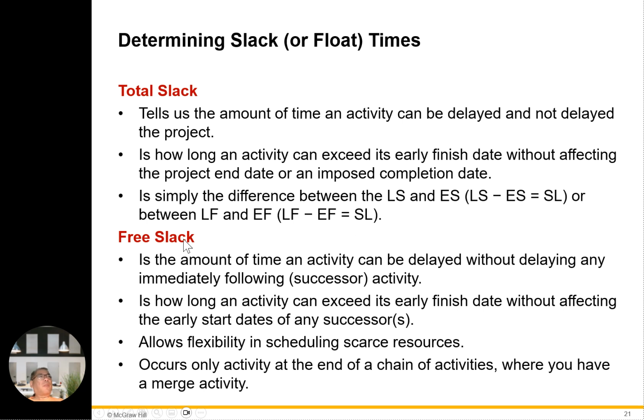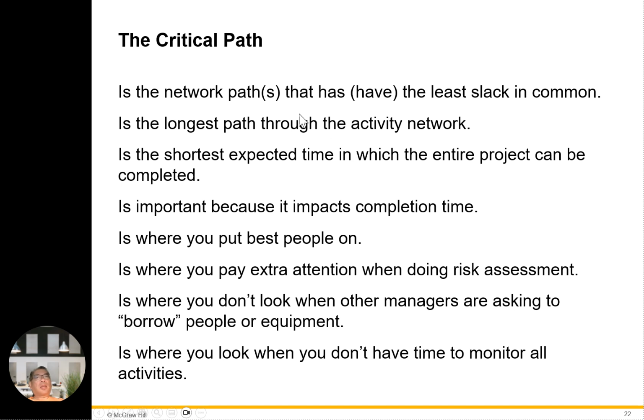Okay, the free slack is the amount of time an activity can be delayed without delaying any immediate following successor activity. It is how long an activity can exceed its early finish date without affecting the early start date of any successors. It allows flexibility in scheduling scarce resources and occurs only at the end of a chain of activities where you have the merged activities.